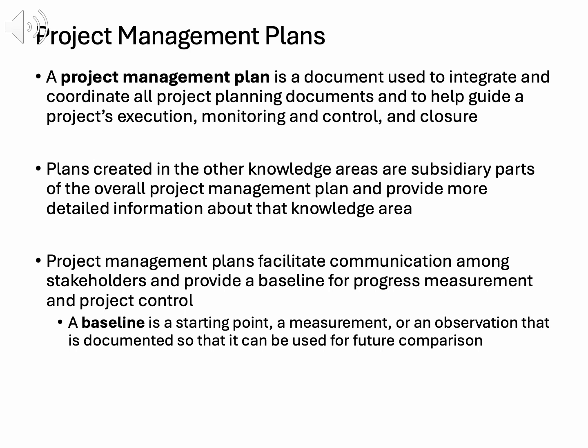A key feature is its baseline function. Baselines for scope, schedule, and cost allow you to measure performance. If the training project exceeds its budget, the plan helps identify deviations and adjust. This ensures control and accountability, preventing issues like scope creep or delays.